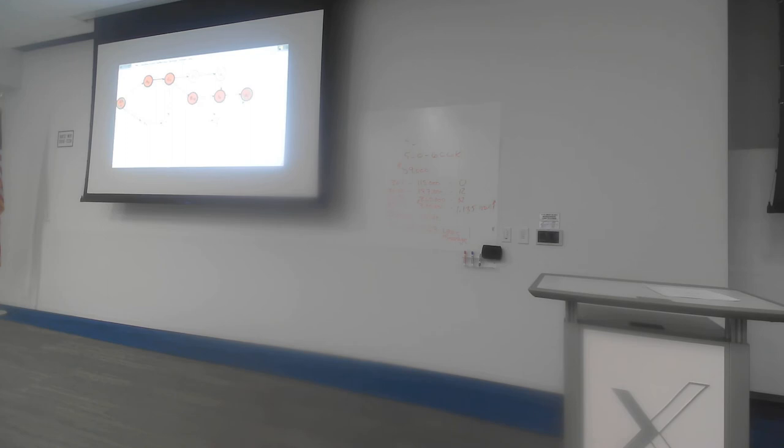And so as a project manager, that means that you have to go back to the drawing board. It usually means that you realize that, yes, certainly a lot of these different activities can be done in a shorter amount of time, but it's going to cost more to do those activities in that short amount of time. I'm going to have to reorganize my resources. And we need to start balancing off all of these different factors to weigh in and decide what exactly is the optimum schedule based on the different types of incentives and costs that are on the table.